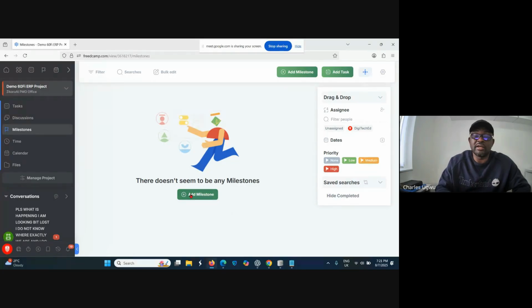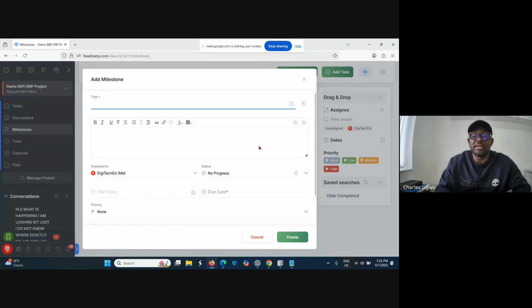So this way you can create a milestone, give it a name and a due date. So at that date, all your target is to hit that milestone. If you break this project into stages and say the target is that by end of 2 weeks, you should be able to finish the initiate stage. You find one item that will become your milestone, or whatever you call your milestone, so that you will work on targets. Once you miss the milestone, then you know that you are really struggling in your project.